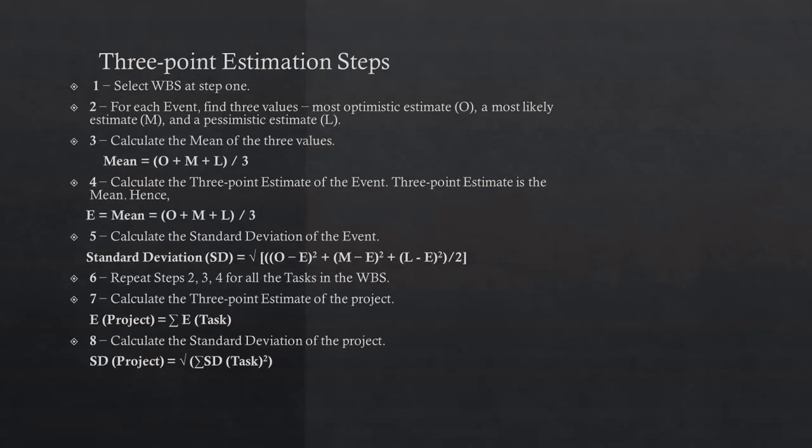The conversion is such that confidence level in estimate plus or minus 1 SD is approximately 68%. Second, confidence level in E value plus or minus 1.645 times SD is approximately 90%. Third, confidence level in estimation value plus or minus 2 times standard deviation is approximately 95%. Confidence level in E value plus or minus 3 times SD is approximately 99.7%.